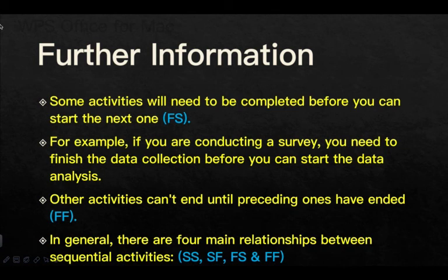Further information: some activities will need to be completed before you can start the next one. For example, if you are conducting a survey, you need to finish the data collection before you can start the data analysis. Other activities can't end until preceding ones have ended. In general, there are four main relationships between sequential activities.